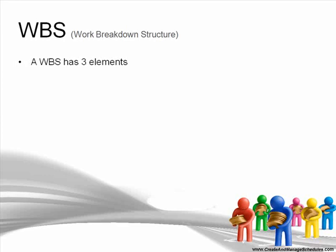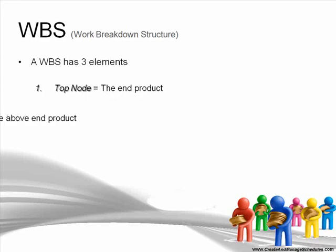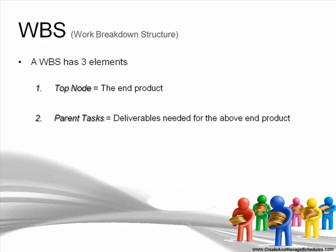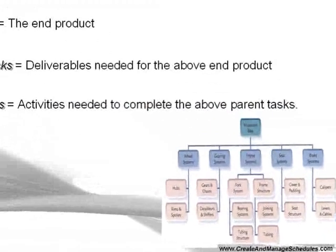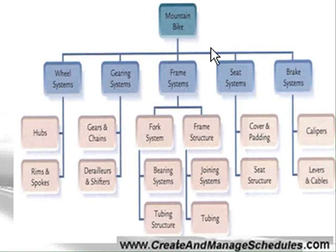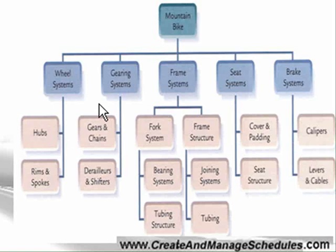The WBS has three elements: the top node, which is the end product; the parent tasks, which are the deliverables needed for that end product; and the child tasks, which are the activities needed to complete the parent tasks. In the diagram shown, the top node is the end product — a mountain bike. The parent tasks are the deliverables: wheel system, gearing system, frame system, seating system, and brake system. The child tasks are the activities relating to those deliverables.